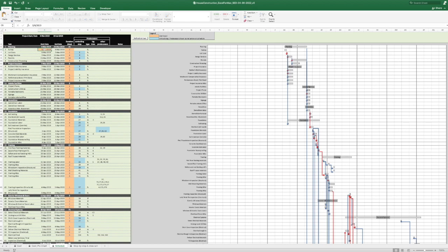So that's going to be your start date for your project. And then there is a built-in timeline, but it's based on these durations. But let me back up a little bit. There's a built-in process in place here. When you schedule things, the industry has things called predecessors and successors, the things that depend on those items being completed.